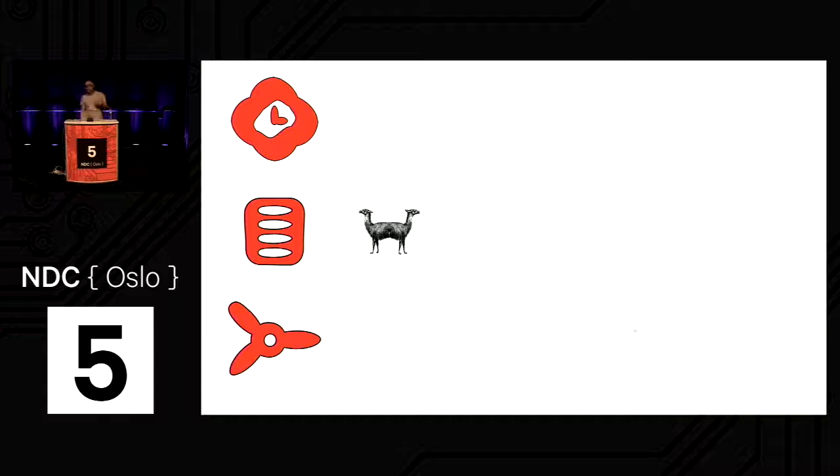The first is scheduling, having to wait on someone. I mentioned this with the architecture review boards. You have to wait for 4 weeks to get your change approved before you can do something. Release trains are another one of these. We have to wait for the next release cycle to come around, because it's on a scheduled basis.